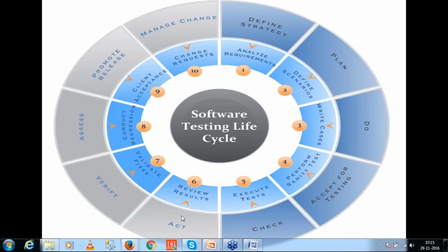There is a concept called SLA, service level agreement, where if it's a very process-oriented project, you will have to make sure the high-level defects are sorted out on the same day itself. The reason is that there are many resources in that testing project, and you might not have the space or budget to make all the resources sit idle, right? So in these scenarios, how you react, how you escalate the issues, and how you interpret the results will also make you an effective, good tester.